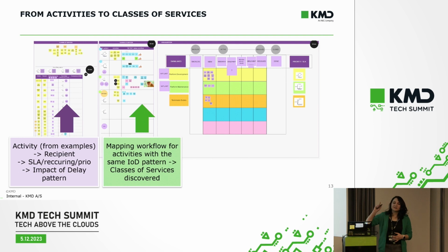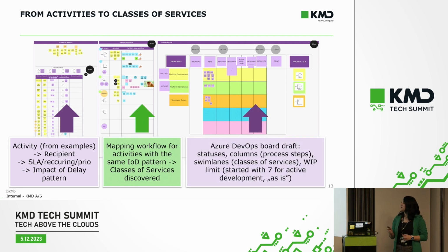And then, and only then, we started to design our Kanban board. In many cases, in many companies, people start from designing the Kanban board. And this is actually more like the last step of implementing Kanban. So then we created a draft, moved this to Azure DevOps.